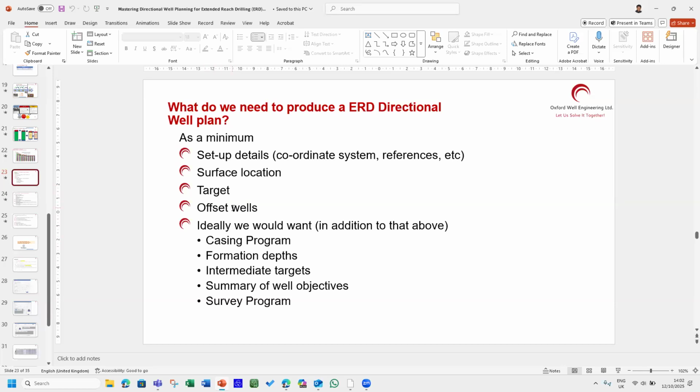They will just give you the target, and then you go from the target backwards and following it from the reservoir, going backward to the landing point and the curve, and then you find out from where you can drill this well. And after that, people will do the kind of survey and everything and find out if this surface location is good or not good. So it depends upon the stage of the project.